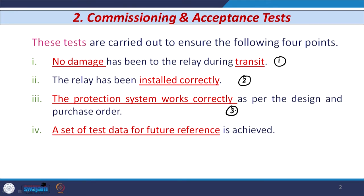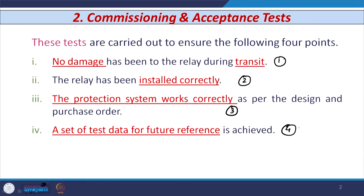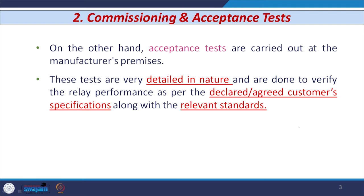The third point is that the protection system should work perfectly as per design specification and the purchase order. All the functions available or mentioned in the protective device need to be tested, and a satisfactory testing certificate is also taken from the manufacturer. The last reason is that if we need to generate some data for future work — when we test the protective device on certain functions, we get data that can be used for further work in the future.